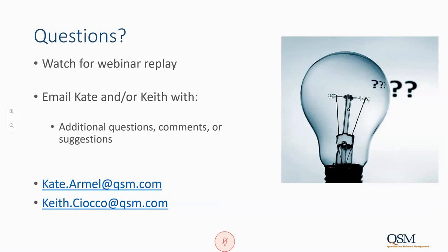If that's the case, what a lot of our clients will do is try to count the inputs, because what we're really trying to capture when we're measuring work is a proxy. When we measure size, it's a proxy for the work. It's the elementary steps that you have to perform to get from a bright idea that somebody has to functioning software on the back end. So what we're really trying to capture is the steps at the smallest possible level that get you from point A to point B. So the inputs to a lot of these tools, in a lot of cases, are going to be a better proxy for the work than the actual code that gets generated on the back end.